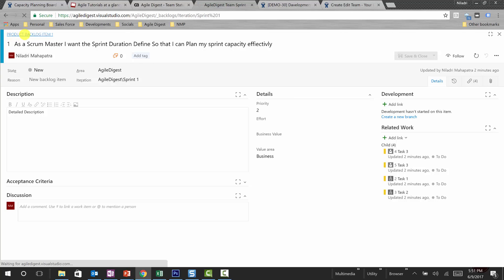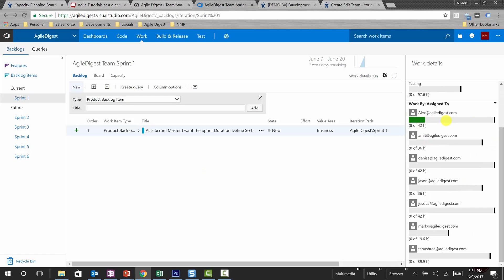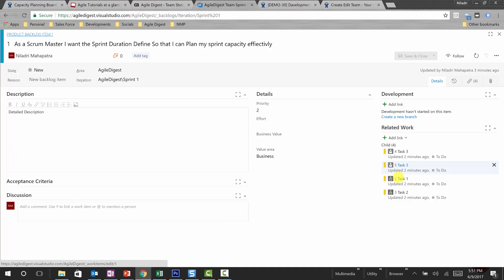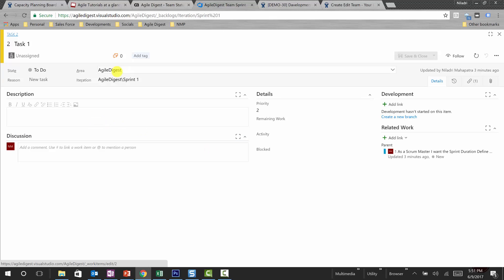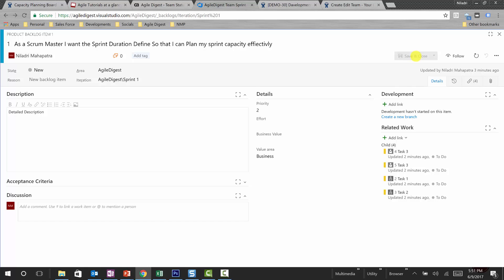So we'll assign these tasks once again and see how the backlog will look like. Let's go back and see, only Alex has whatever capacity he has. This gray area of capacity is still available, and 8 of total 42 hours is occupied. Now we'll assign the task to, for example, let's assign some task to Amit. We'll do this by assigning this task, task one, let's assign it to Amit, save and close.